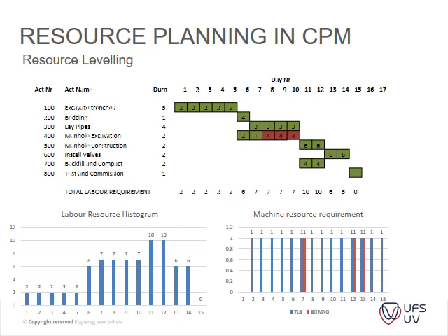Okay guys, so what we did was a bit of resource leveling. Instead of day 7, where we required 2 TLBs, we only used the TLB to lay the pipes. But if we don't use the TLB, it extends the manual excavation.